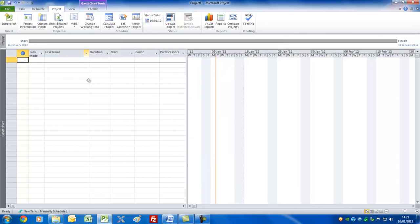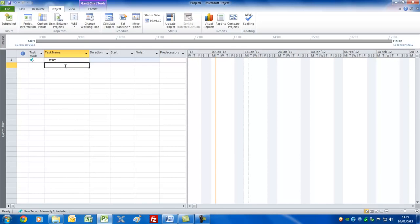The next thing is to set up the tasks themselves. If we go into Task Name here and type 'Start', that'll be my first milestone. You can enter it either by clicking another cell, or by using the Return key on the keyboard, or the arrow keys — either of those would work.